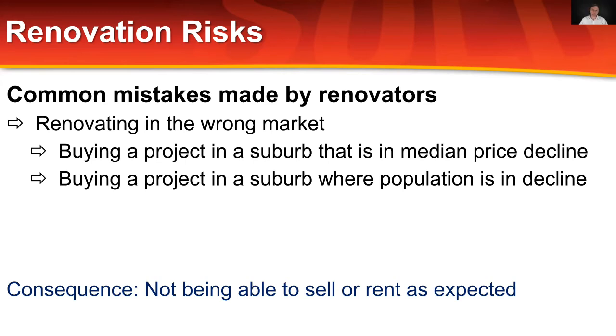The other cause, again, not directly related to the renovation itself, but to the project, is renovating in the wrong market. Now, we're not talking wrong suburb. We're not talking about producing a product that nobody wants. We're talking about buying in a suburb where the median price is in decline, or buying in a suburb where population is in decline. If you're buying in an area where the suburb values are falling, you are setting yourself up for a significant risk. So where you buy is critical in being able to preserve your ability to make money. Or in fact, if you buy well, you can amplify your profits by buying well.